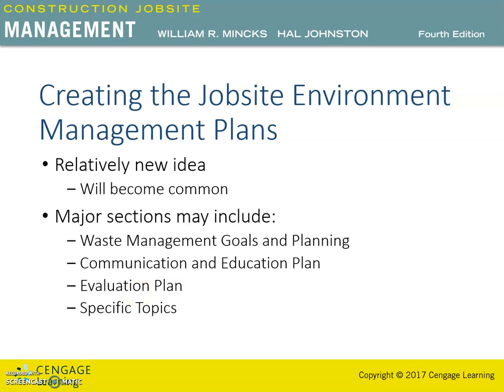Some specific topics are also considered in the job site environmental management plan. These topics can be divided into the design phase, construction phase, and operations phase. So, for example, in the design phase, waste prevention in the design documents is important. Creating and suggesting green alternatives should be done in the design phase.